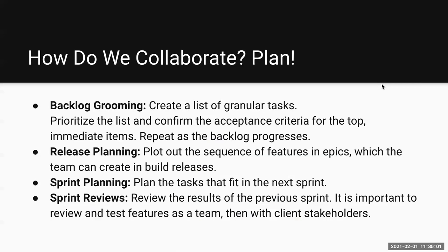Sprint planning. Well, you've got your backlog, you've groomed it, it's ready to go. Now you're going to pull the stuff right from the top of the backlog because it's already prioritized. What fits in your sprint? Who can participate? Do the numbers look good? Is everybody using good commitment language? I will do X by Y. Within the sprint, whether it's a week, two weeks, three weeks, whatever it is, anybody that pulls a task into that sprint, unless something terrible happens, is committed to finishing those tasks.